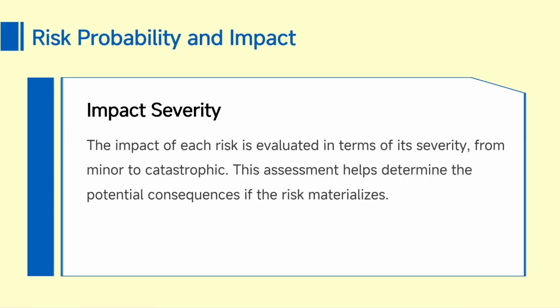Second is the impact severity or impact basically. So, even though we have the project probability, meaning the risk probability, how much it is going to impact is very important. So, it ranges from minor to catastrophic. So, to be specific, we have 4 main impacts that is considered overall. So, one is negligible, second is marginal, third is critical, and fourth is catastrophic.